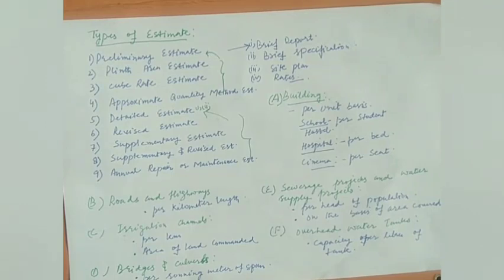So for that case, a supplementary and revised estimate is prepared, and the fresh technical sanction of the competent authority is obtained.